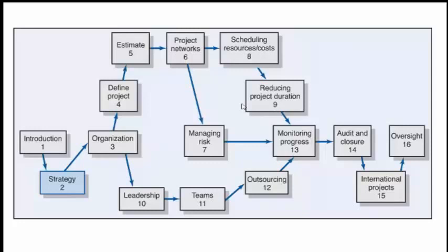So this is how you execute the project, whether you want to have a dedicated full member team. So that is the best thing, but the only thing is it is costly, in the sense you need to recruit people or get people dedicated for the duration of the project, but the synergy and other things are very good. In terms of functional projects, you get expertise. In projectized, you will not get much expertise. In functional projects, you will have the experts, but the only thing is the delivery and schedule may not be adhered to strictly.